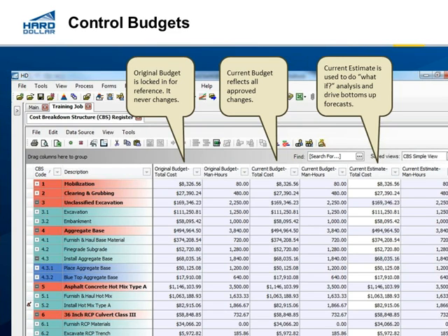So if you turn around and use P6, somebody goes and changes the schedule, they fire it back, it's going to go to the current estimate. Right. So the question is, if we sync, essentially now we sync our schedule, or we sync to P6, and let's say we have a duration change, and we're going to stay in sync with that duration change.